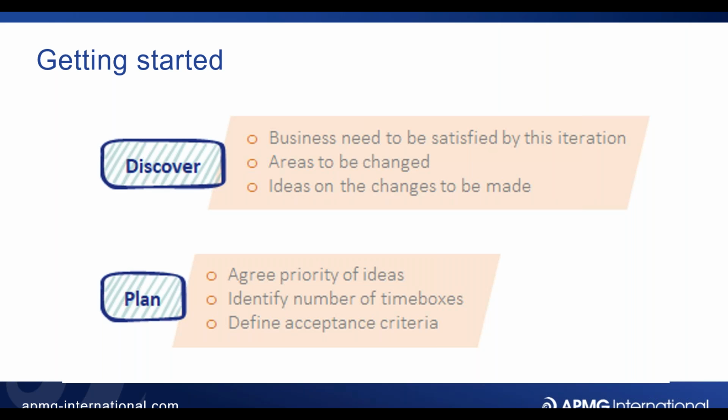And I see how important this is, because it's an eye-opener when you first start doing this collaborative planning, because the project team can identify all of the technical pieces of work that they need to do, they can brainstorm through that. But what they are hearing from the business is, if you like, the effect of their work, that actually they might have coded this feature on the app, but the impact of that is that this group over here have to send a notification to another department that this is how they're going to be working from now on. And this is where they can get the data. They have to tell the front desk staff that they're no longer going to have paper templates. They have to put up posters, and they have to send out emails to all the students to let them know this is the new process for how you book your accommodation. They have to let the students' union know that this is how we're now going to be treating students.